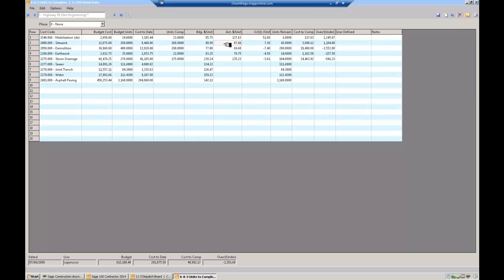This is the information that's useful during the job, but very, very useful as a job is completed, that you sit down with both your project manager and the estimator that estimated the project and compare notes on why the estimator thought it was going to cost that, and the guy in the field spent that. No finger pointing, no blame, but let's make sure we don't make this mistake on the next job if this is going to be an occurrence on the next project. Or is this a one-off where something just didn't go right or we had to do something twice for some reason? But I want to know why I spent almost twice as much as I should have.